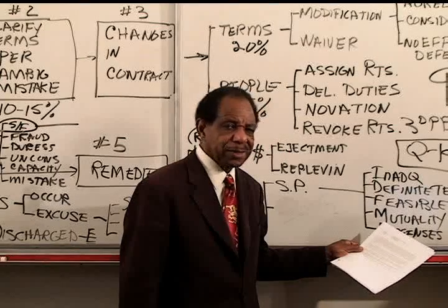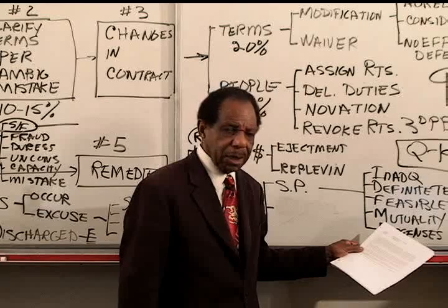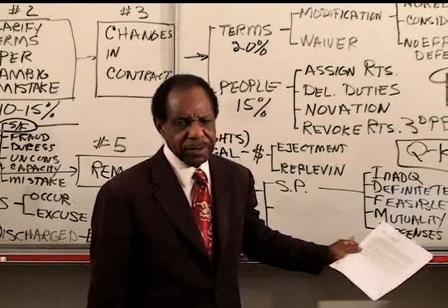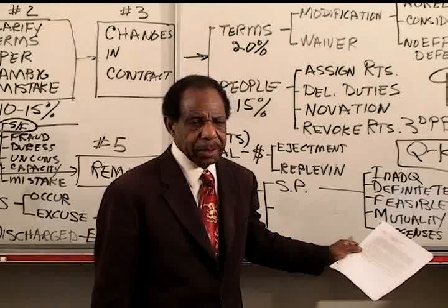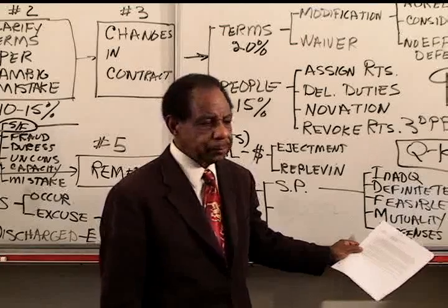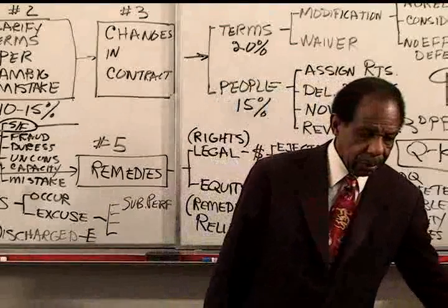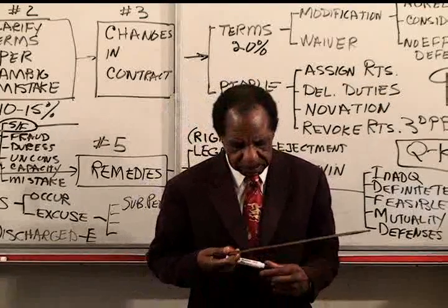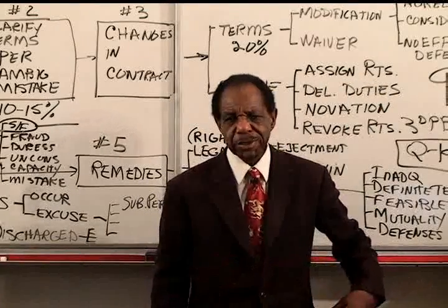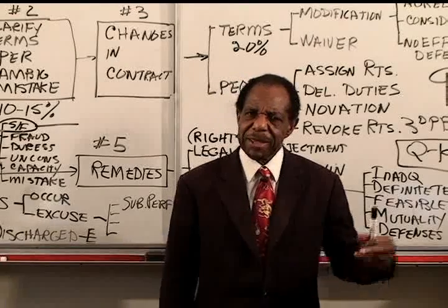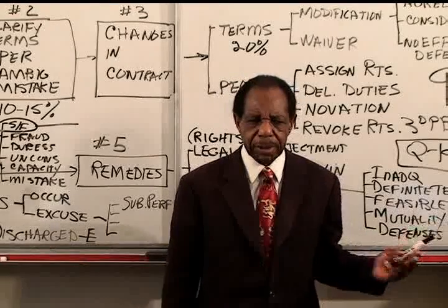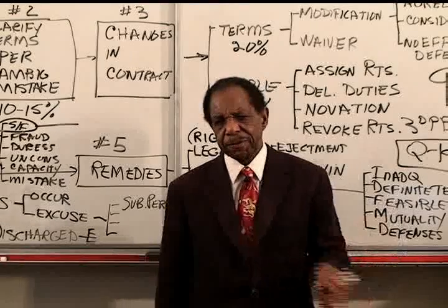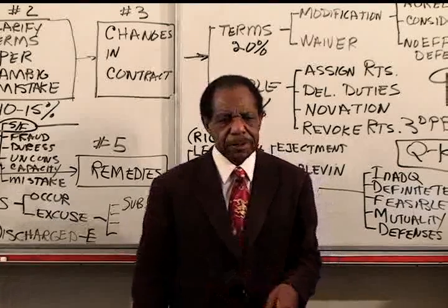So buyer never signed that modification, and you don't have anything to show that the modification is effective against buyer. Now, the one thing that you do have is that buyer, if you can prove that buyer orally agreed to this modification, may have waived the time for completion being February 1st, have waived that so that you now have more time.